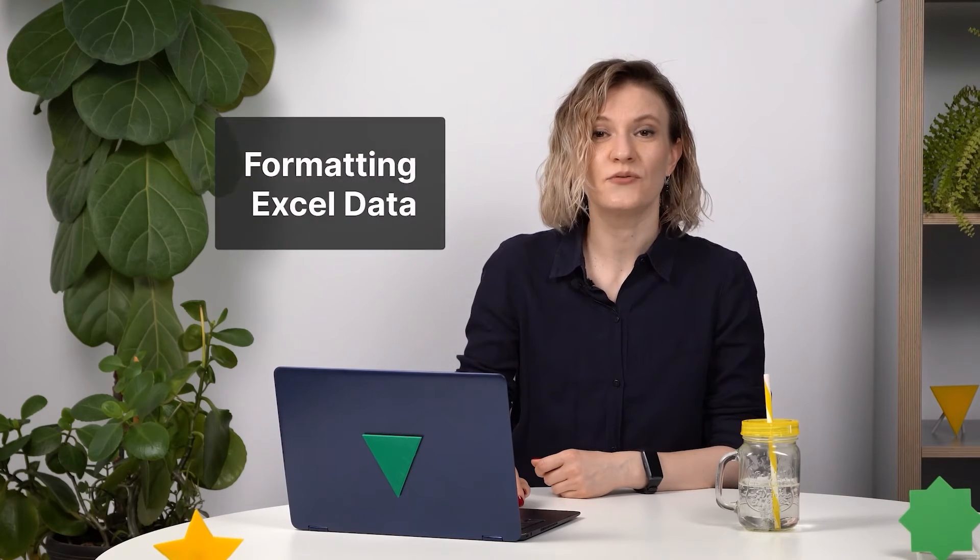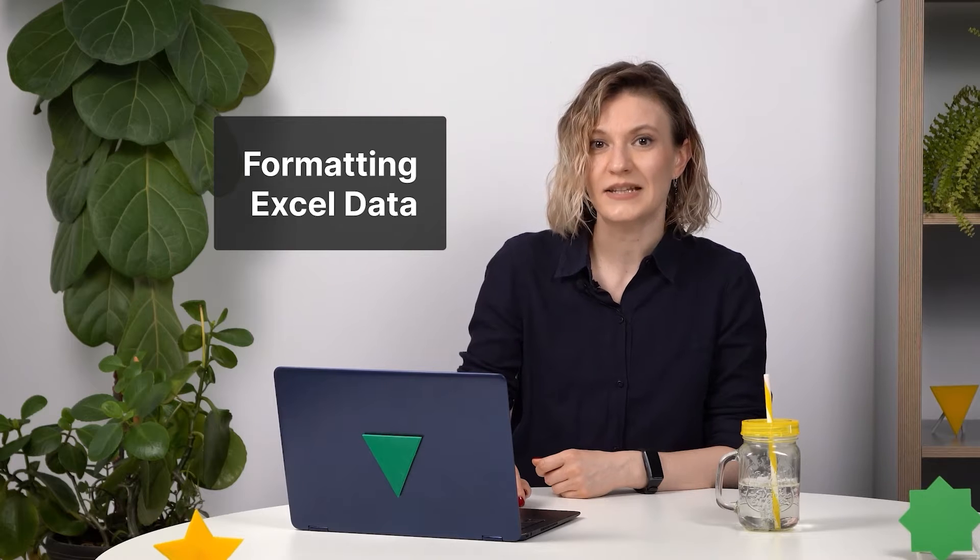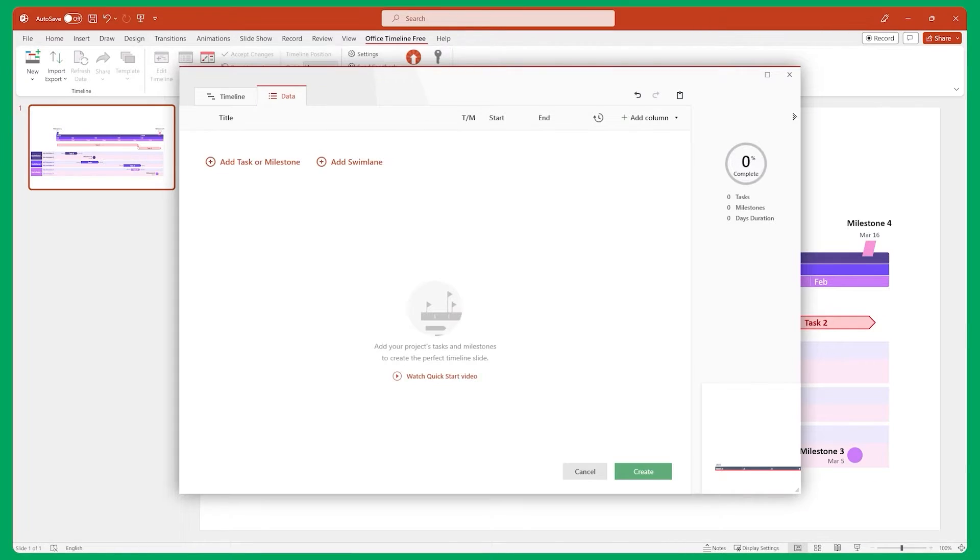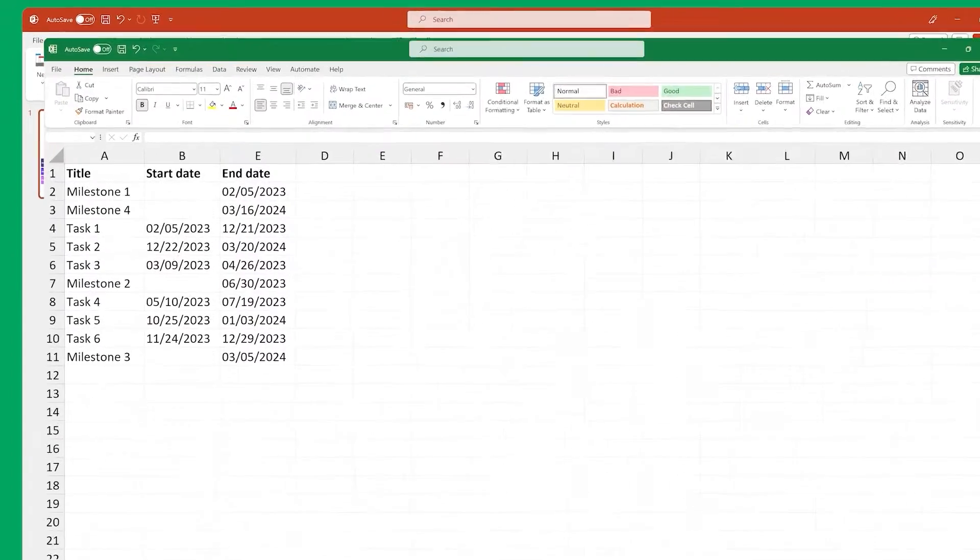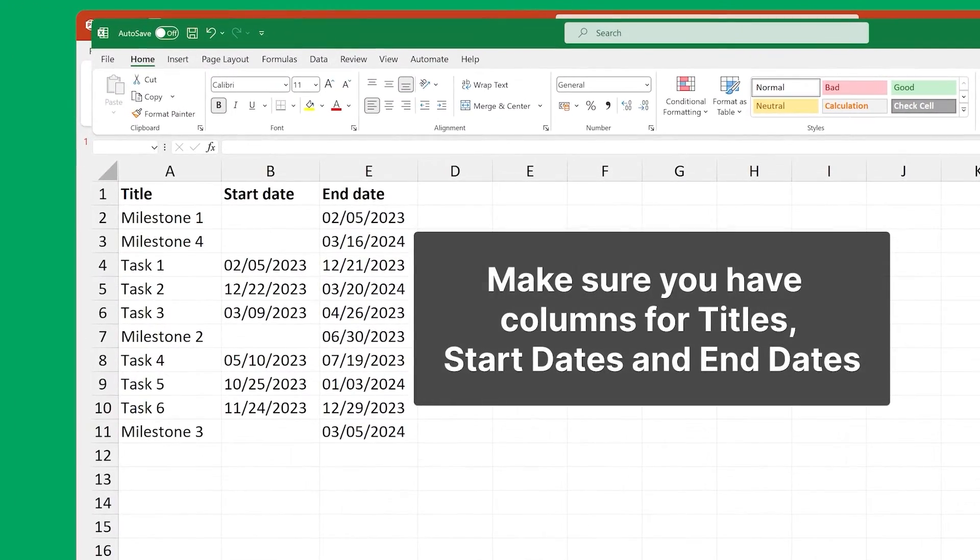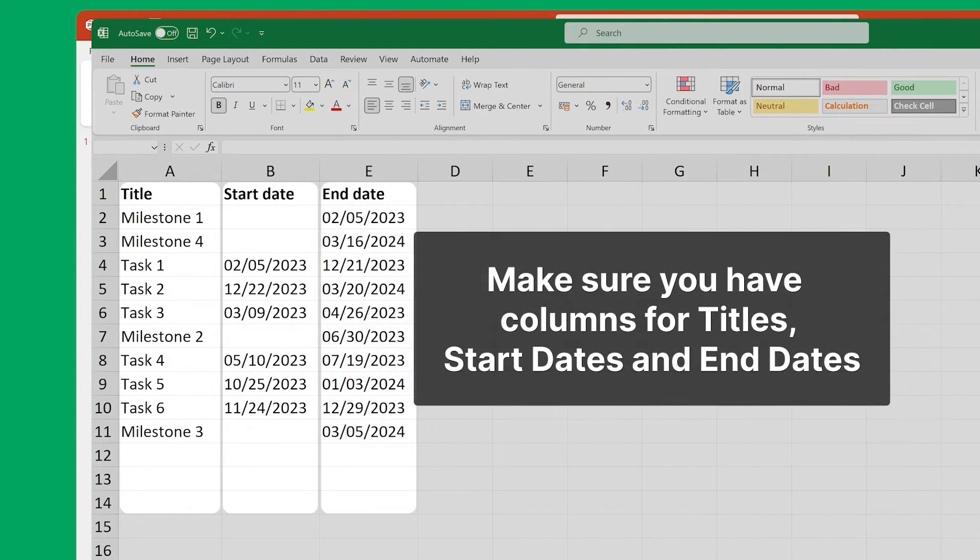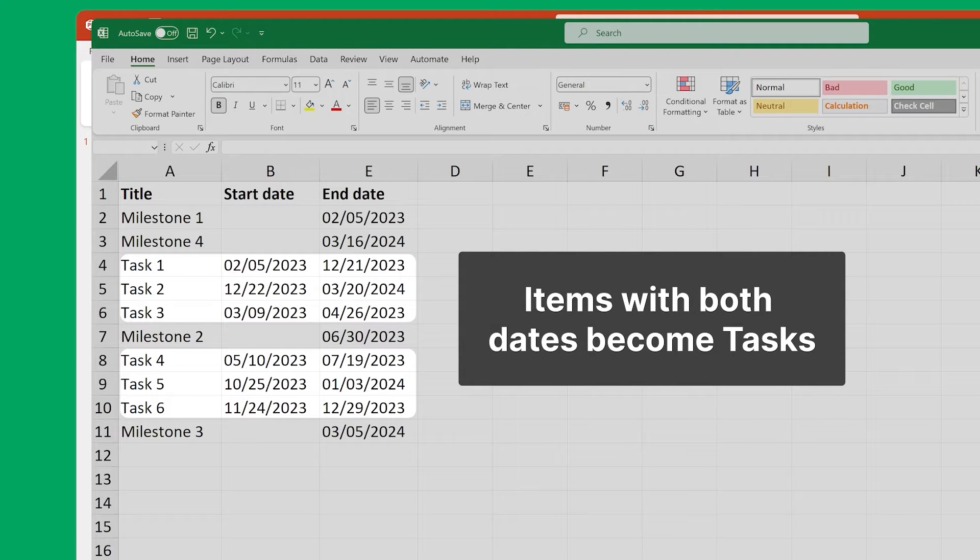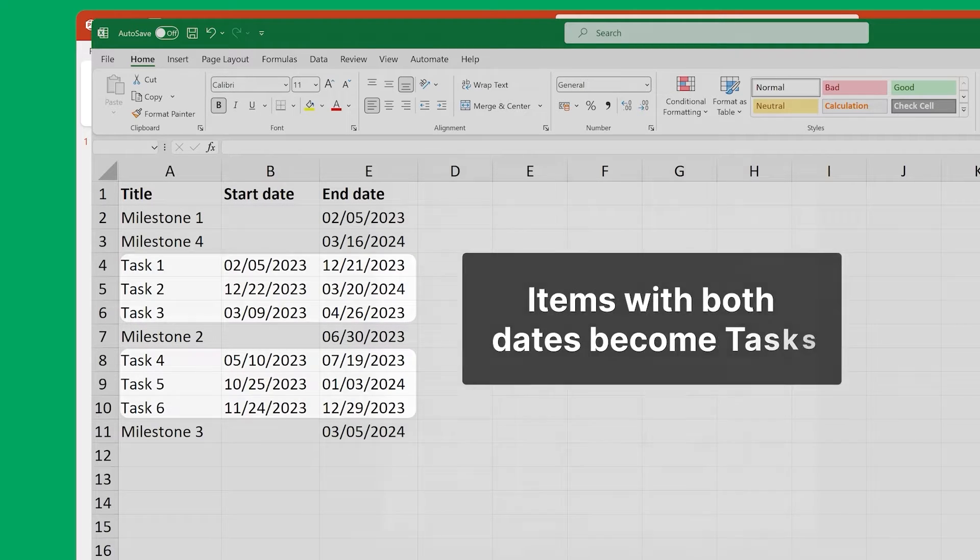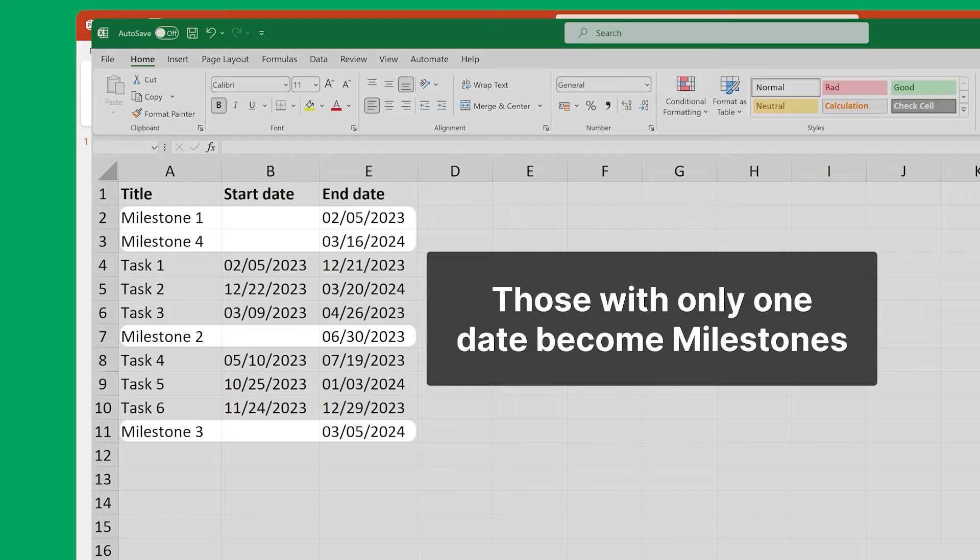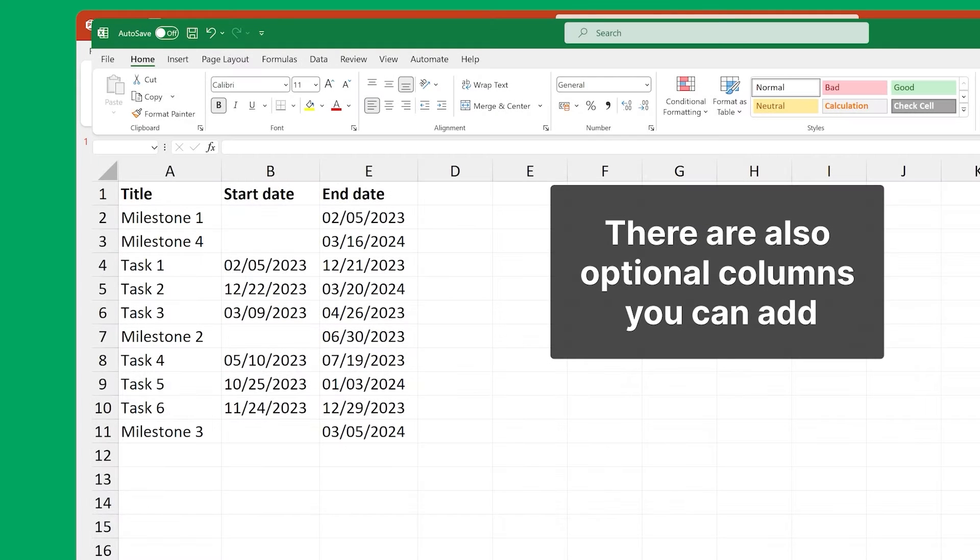Before we hit copy on our Excel data, we need to make sure that it's formatted in a way that Office Timeline can make sense of it. It's pretty simple, actually. All you have to do is make sure that your Excel sheet has columns for titles, start dates, and end dates. Items with both dates filled in will become tasks, while those with only one date filled in will become milestones.